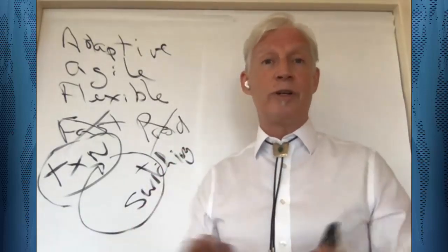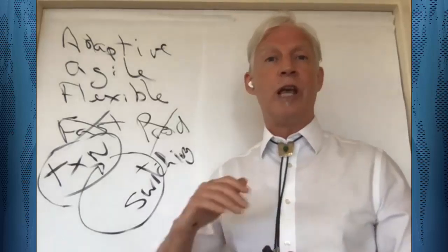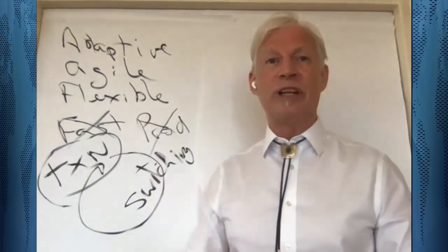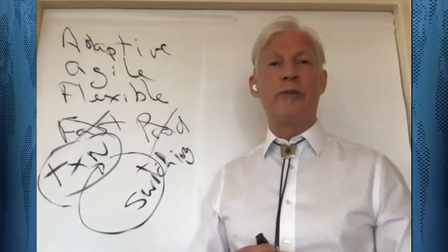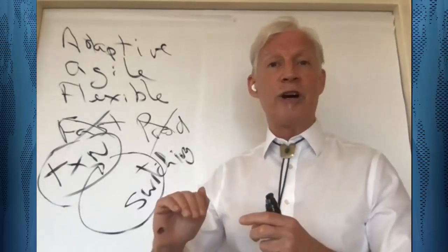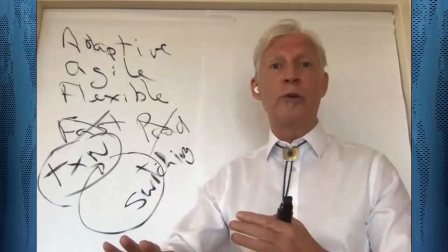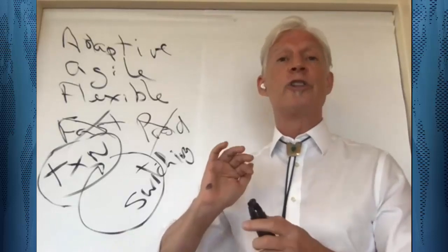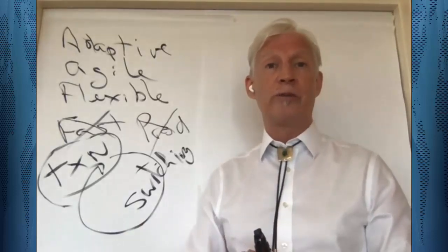And the key point I want to conclude this little section on is that if you want to quantify adaptiveness, what it really boils down to is the question: are the transaction costs of your organizational design as close to zero as possible? And are your switching costs as close to zero as possible?